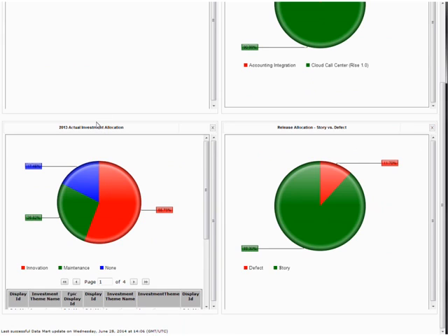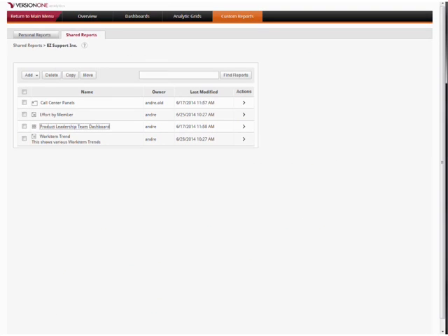I've talked to a lot of customers who use custom reports just to make sure their processes are being followed. Don't start work unless it has an estimate. Create a report for work without estimates, and then periodically monitor that to make sure that your process is being followed. It helps ensure that you have good data so that the reports down the road are accurate.